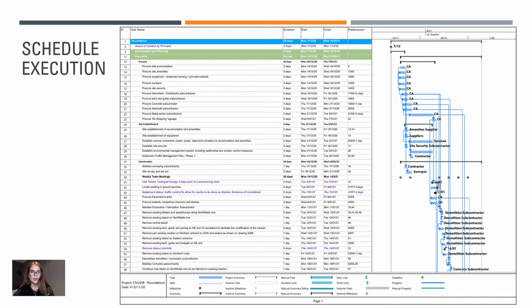The execution cycle of the project is by far the most extensive cycle and crucial to ensuring the project is delivered on time. This section comprised of procurement, site establishment, monitoring, reporting and controlling, WHS and environmental management, and handover. The Eastern Entry Roundabout contractor was awarded the contract on the 7th of December 2020 and handed over the project to the principal on the 10th of February 2021, which was a total of 39 working days.